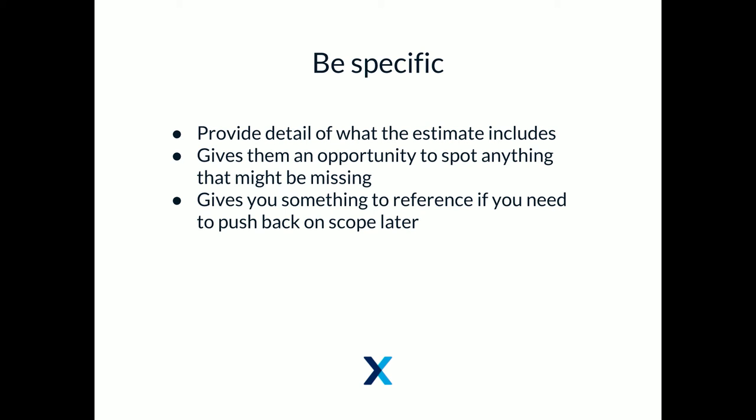And then the other thing I've found is that you should be really specific. This is something that I picked up from my partner who has a painting business. Whenever he does a quote, he specifies exactly what's included. So prep, 2 coats of paint, cleanup, or sanding, whatever. The reason that he does this is because sometimes he'll give that quote to the client, and the client will say, I actually think it needs 3 coats. And he can say, okay, sure, I'll add that to the quote. But then you're not in a situation where he goes in and does the work, does 2 coats, and then they're saying, well, I think it needs 3 coats. And you're arguing about what you had said you were going to do because it wasn't actually totally clear what you were going to do.